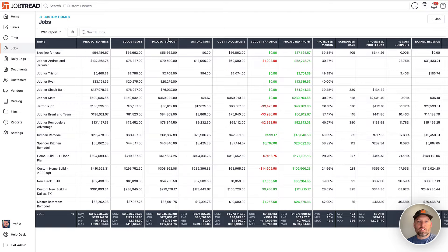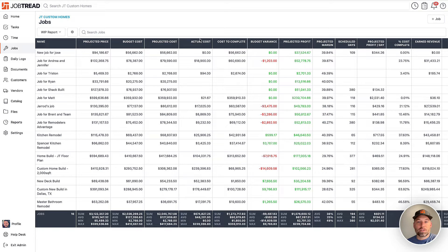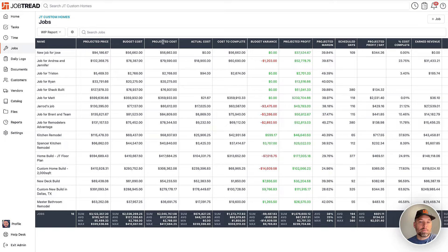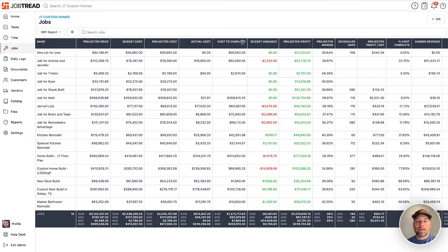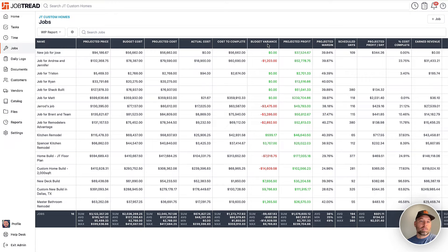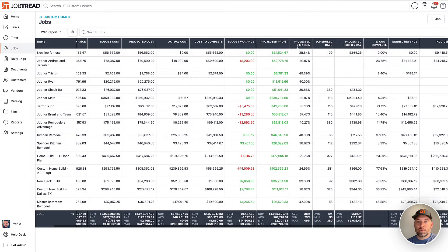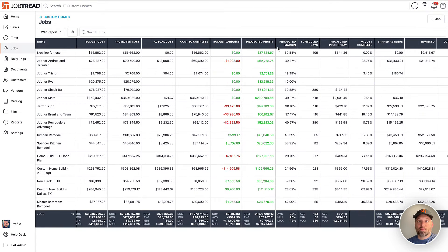Our projected cost is our up-to-date cost projection. Actual cost: what we've actually spent so far. And then the cost to complete is the difference between those two, showing you it's my projected cost minus what I actually spent. It's the money I intend to spend to complete the project. The budget variance is the delta between your budget and the current projection. And then the projected profit and projected margin are pretty self-explanatory.